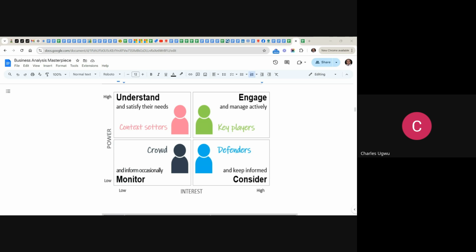Most developers are freelancers. They have a lot of people they are working for at the same time. They will collect jobs from A, B, C. It's whoever gives them pressure that they concentrate on. So you have to monitor them. Whichever time you work with them, make sure you check that they deliver within time. That's why, if a project manager is not monitoring very well, and you go to their project environment like FreeCamp, you see a lot of overdue.